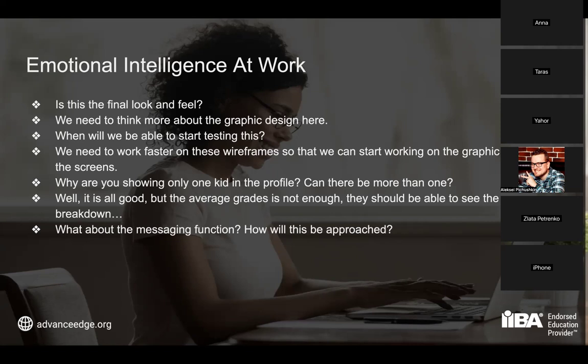but I know what they are currently expecting from me based on this feedback, and I can be more proactive in educating them and teaching them, well, that these are the wireframes, and we cannot start with the graphic design until we approve the wireframes, because the graphic designer will have to redo the same things over and over again. It's a waste of time, effort, and money, right? I can also tell them that this is just the beginning, and I understand that we need the drill down for the grades, and so on and so forth, right?